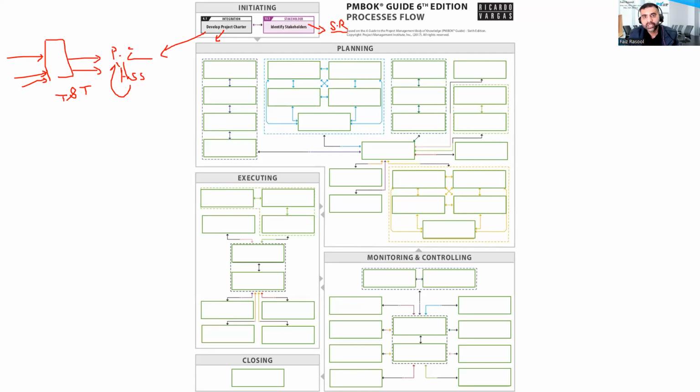That is a living document where we keep on identifying and adding our stakeholders, not only stakeholders, but their impact on the project, their influence on the project, their interest and their power on the project. And then we try to make these stakeholders supportive of our project. If not supportive, then at least neutral. Once our project is initiated, the project manager is assigned, key resources are assigned, we identify high-level risks, we make high-level assumptions, and we have seen the overall schedule and a high-level budget, etc.